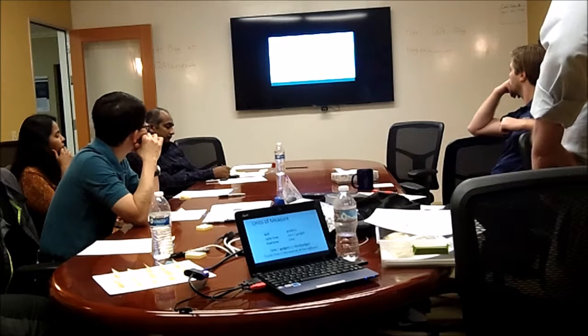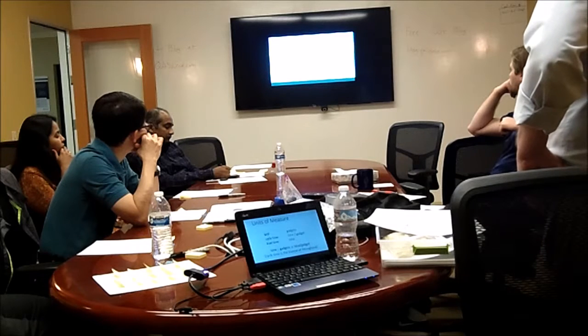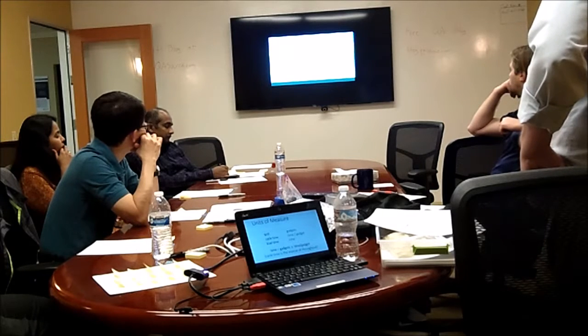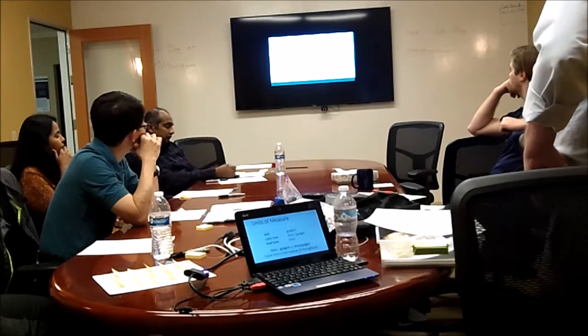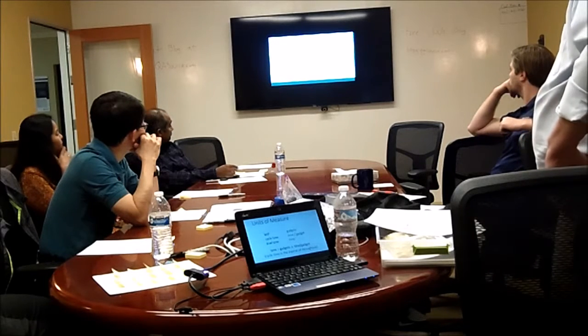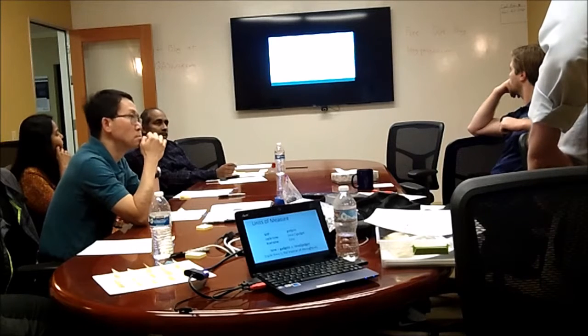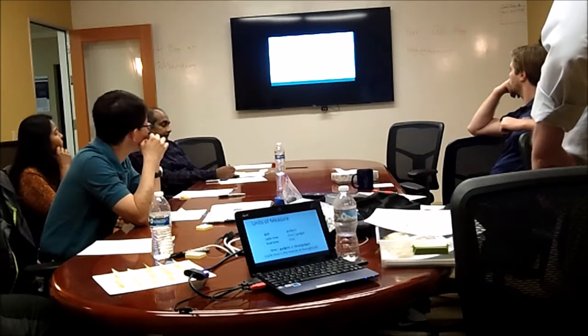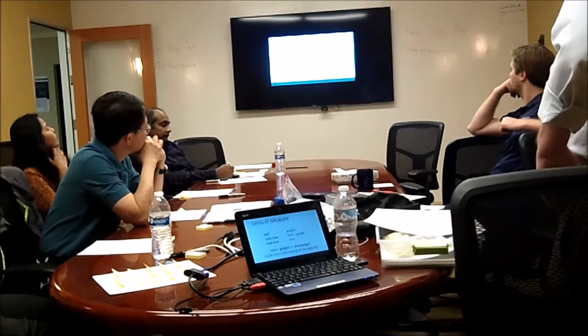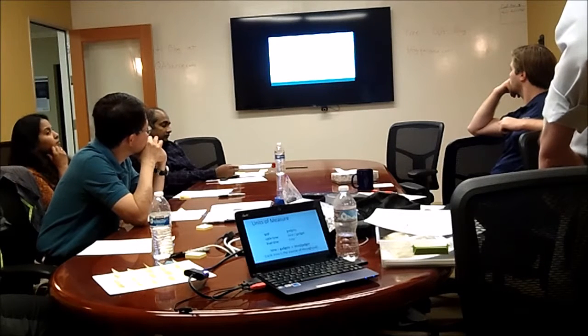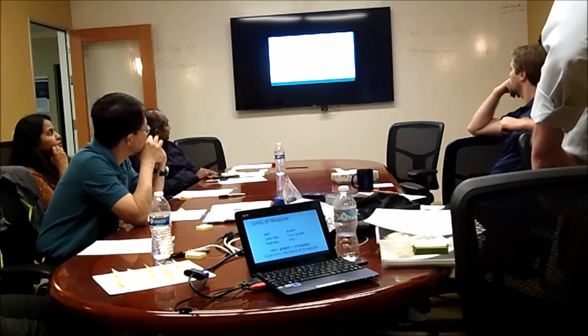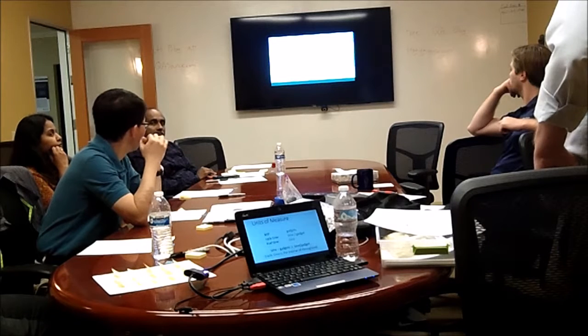So lead time, their time, equals the number of gadgets times time per gadget. You see that gadgets cancel out algebraically, and so you have time equals time. And in parentheses there, cycle time is the inverse of throughput. And that's sometimes useful to know.